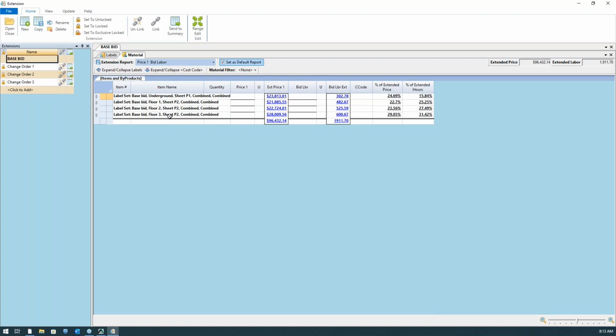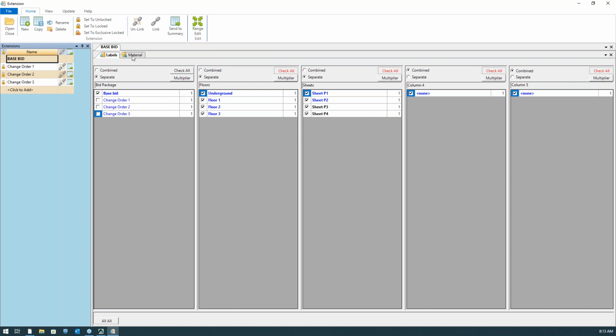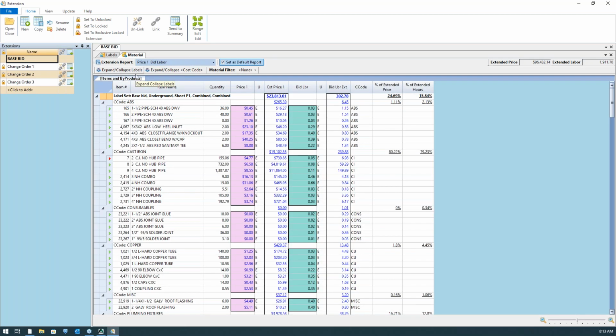I also could look at more of a macro view, just look at the totals, total material dollars, total material hours. So step 4 here is just about sorting the information, choosing how we want to view it, and making adjustments. This is the point where our estimators would go in and double check everything, maybe adjust some quantities, maybe adjust our labor up or down given what we know about the project itself. So step 4 again, review and make adjustments.